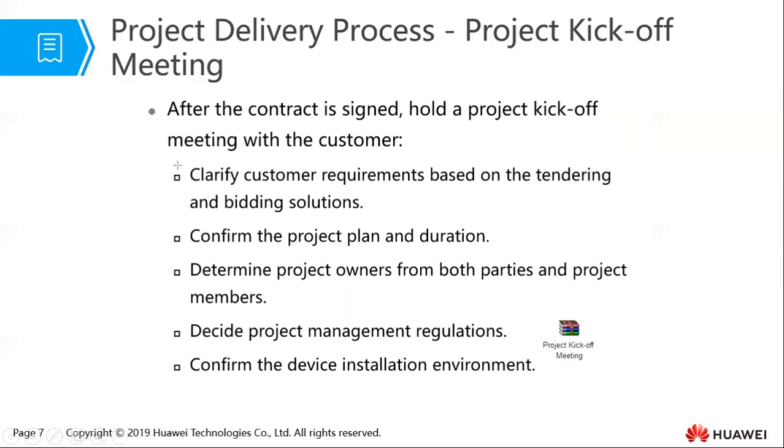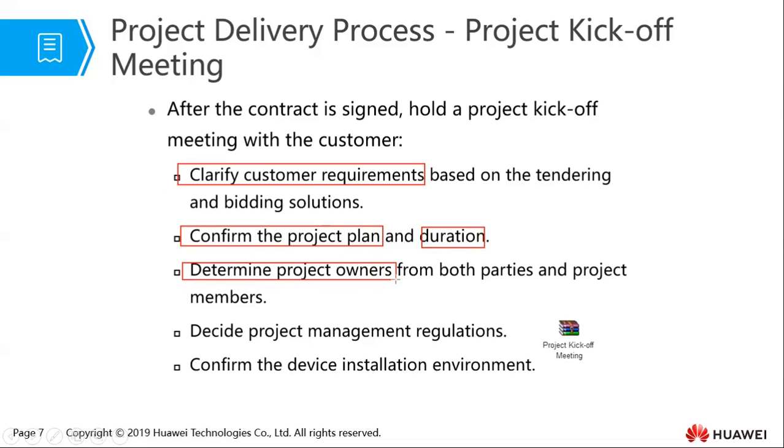Why do we do this? We want to clarify the customer requirements as it has been specified on the tendering documents and the bidding solution. Then we want to confirm the duration of the project and the entire plan of that particular project, to determine the owners from both parties and the project members, to also decide the project management regulations and to confirm the device installation environment. So where you're going to install those particular devices, is the environment ready?